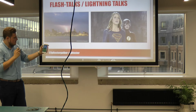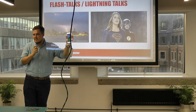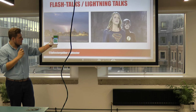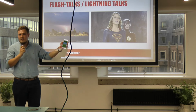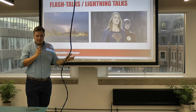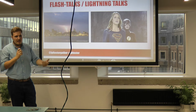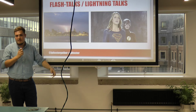I'm not sure if you can see that, but in the sprint planning session, you would look at a piece of functionality, and every member of the team would go through these cards and vote on it, depending on the time you think it would take. I think it's a really good method because a developer, for example, might have more experience in one area than another, so they may have a higher voting card, and that would provoke a discussion: why do you think this is hard, or why do you think it'll take more time?